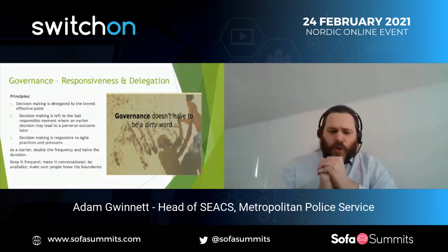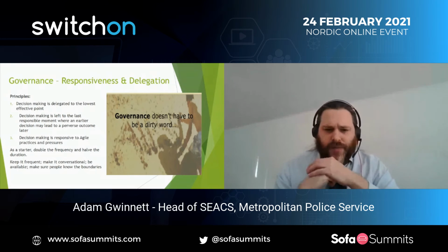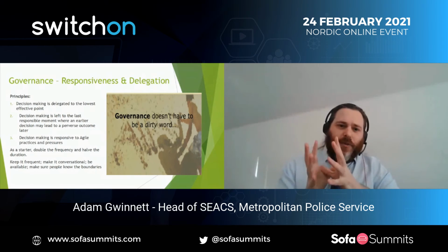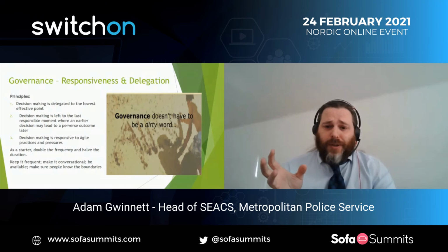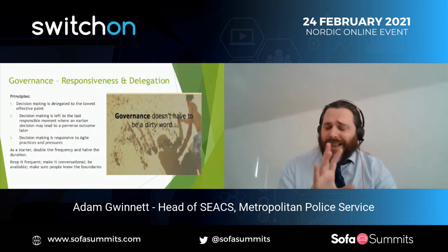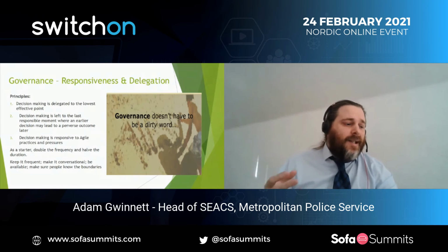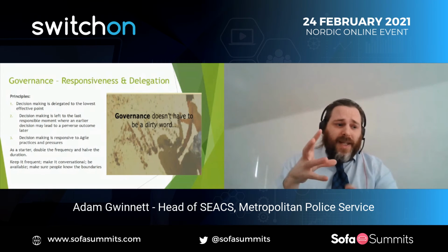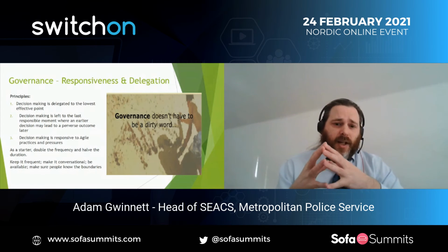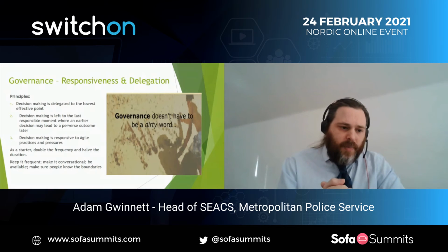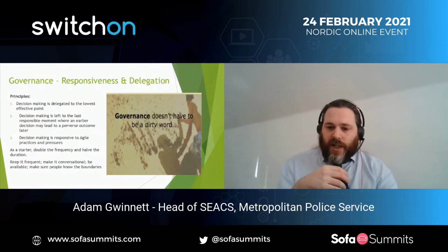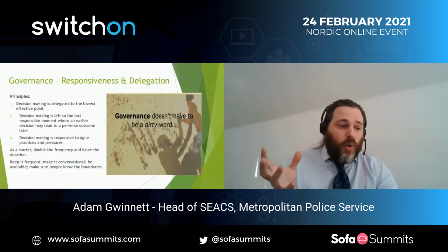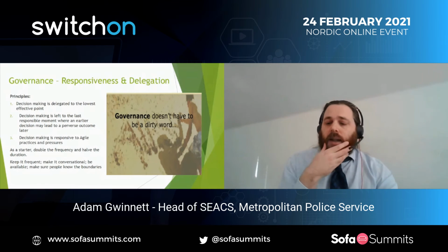A slightly more contentious area is governance of innovation. You really need to do some governance of innovation, simply because there are too many brilliant ideas and too many tools that you could use, and not enough time or money in all of the world to do those things. So I used to use a small group with a mixture of disciplines to understand whether it was worth us pursuing a thing. And that would either be a concept that somebody wanted to do, an exploratory app in relation to, as an example, or adoption of a new technology.